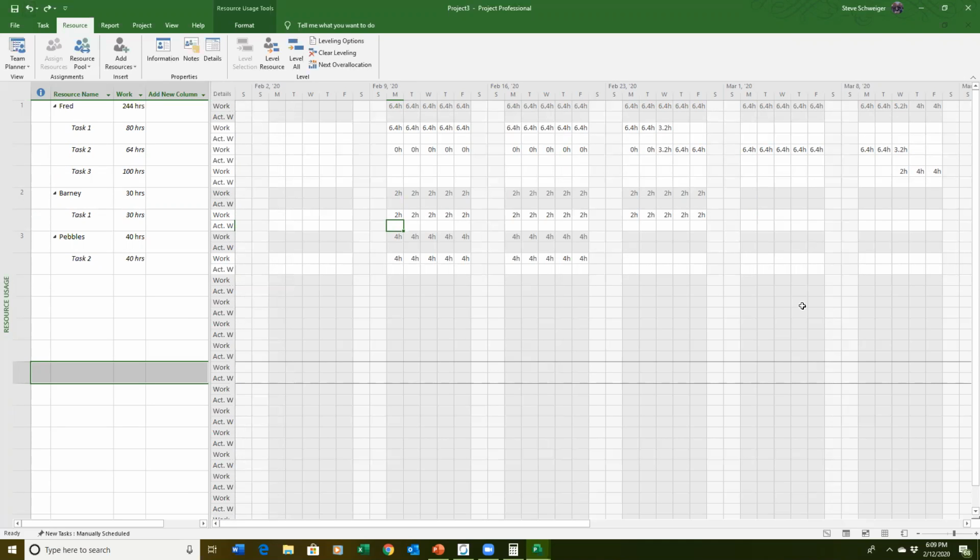So that's what you would be doing with the schedule, is you would be modifying the actuals and hopefully getting updates to the ETC. The resource may put 1 hour in here, may say, this is only 10 hours worth of work. This thing, you would modify your ETC or your remaining work. We would have to expose that column here.